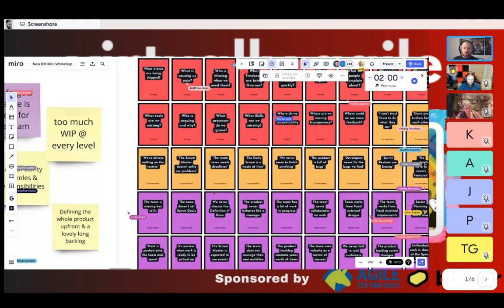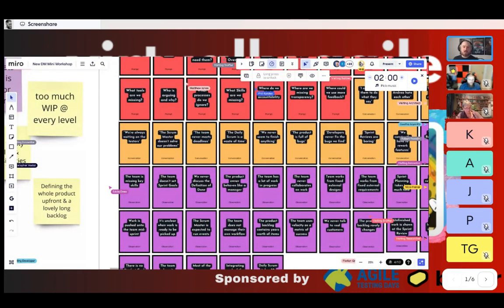And then the purple cards, those are observation cards. Those are examples of things that you as a specialist might observe that you think could be related to or the cause of some of the problems that we're otherwise seeing. So, let's see, the team doesn't set sprint goals is a really good example. The reason that's a useful one is because, I don't know about you all, but my experience is that lots of Scrum teams don't set sprint goals. And the problem with that is often that they don't realize or don't know that they should set sprint goals because they never really got any good training in Scrum, or it was a long time ago, and they've just forgotten that that's actually a thing that Scrum says that we should do. So if you're just asking people, well, what do you think is wrong? They might not necessarily identify that as a problem. But we as experts in Scrum, we might see that and we might recognize it.